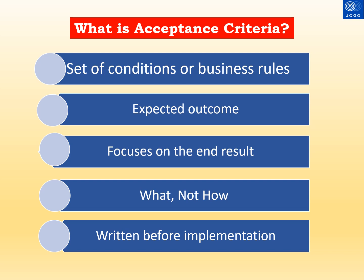Let us see what is acceptance criteria. As we are aware, in agile projects requirements are captured in the form of epics, features, and user stories. Each user story will have the acceptance criteria. Acceptance criteria is a set of conditions or business rules which should be satisfied in the functionality of the product in order to be accepted by the product owner.